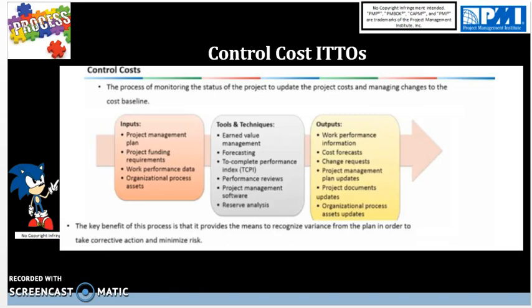Work performance data are raw observations during project execution. This includes information about project progress such as which activities have started and progress completed, project information or deliverables for the project. Also, it includes authorized costs and costs incurred. That's the raw observation. That's what work performance data is coming in for.